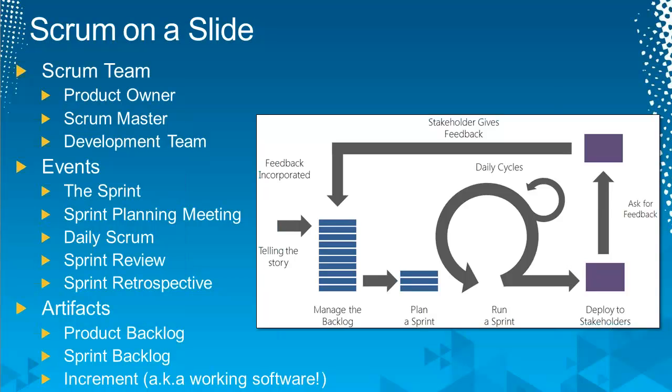Sprint review is where you would inspect and adapt the product, the increment that you're delivering. Sprint retrospective is where you inspect and adapt the process: what went well, what didn't go well, and what do you want to change for the next sprint. And if that's a Friday, sprint 2 starts Monday. There's no gap between the sprints. They're just end to end.